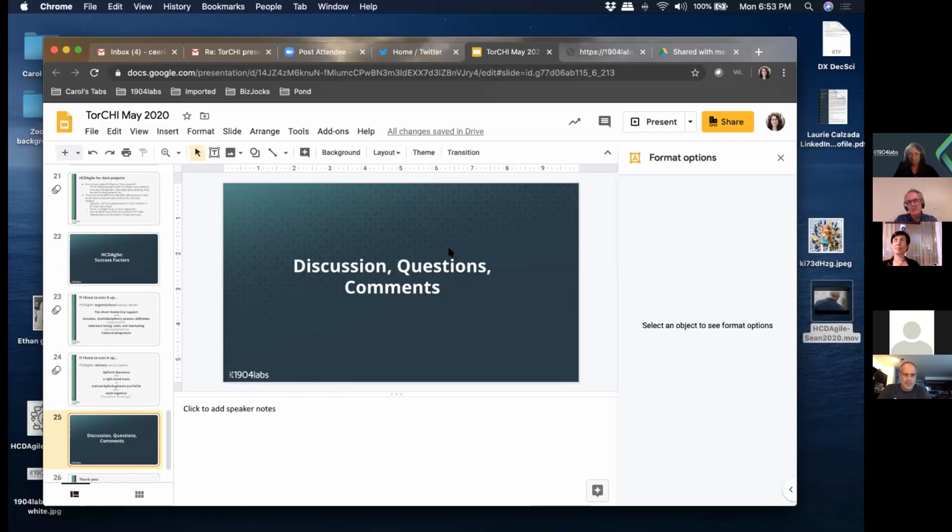Thank you. And I assume the story map, the amount of time spent on that is relative to the size of the project overall then? It's not a huge variation depending on the size. I mean, most of our projects tend to be lengthy. They go on for at least a year. But even smaller projects still take a couple days to story map. Some of the story mapping exercises do go on for 2 or 3 days to get the whole thing. But yeah, you could do a smaller one as well. Thank you.